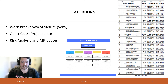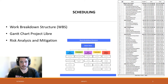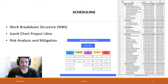These delays can come from days lost due to poor weather, unavailable staff, material and equipment delays, and other factors. So 10 days was added on the ProjectLibre software throughout the project as non-work days to account for this. Up next, the costing analysis will be explained.